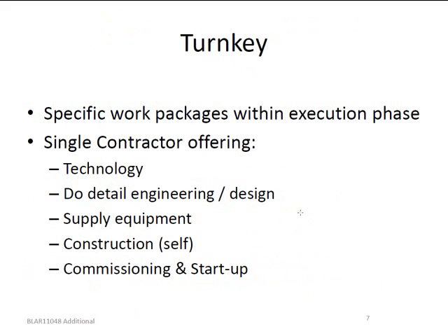If we look at a turnkey project, important for this one, it's a technology that belongs to a turnkey provider. The turnkey contractor is going to do all the detailed engineering and design for us. He's going to supply the equipment, construct everything, and he is going to commission it.